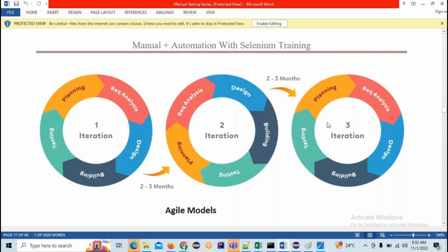But Zomato said that they need this development in the agile methodology. So how does the agile methodology differ? For example, if you use the waterfall model, the customer won't see the application until the project is completed. In the Zomato application, we have 100 features. The customer is not able to see that application until those 100 features are completed.